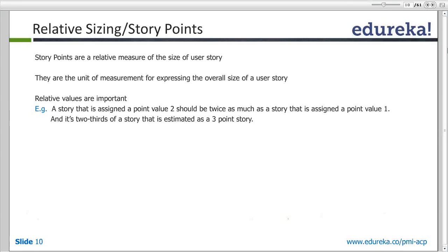I see. So it's not based on the complexity, I mean the size. We have to estimate based on the priority. So when I am saying even login screen, right? You might not be able to estimate. You would say it has a lot of backend implementations involved. So let's break that into tasks. You need to know what all things are involved in implementing it, right? You will have to disaggregate it. You can't estimate it unless you know what actually needs to be done there, what all activities would be involved.